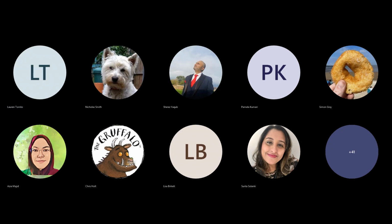Yeah, absolutely. So when I was working for the Department for Education, we had a business case for a discovery and an alpha. The discovery was an 8-week discovery, and we had a pretty standard discovery team: a product manager, user researcher, a delivery manager. We had a technical lead, but more on a part-time basis, and again, a UX and a service designer on a part-time basis. So that way you can calculate the team that you need for roughly 8 weeks.